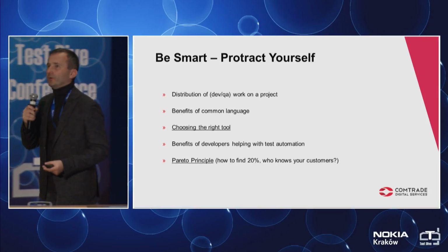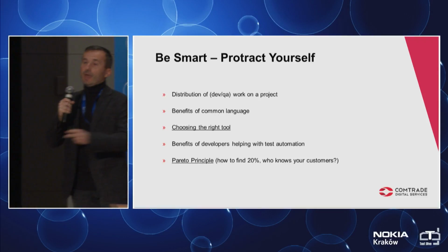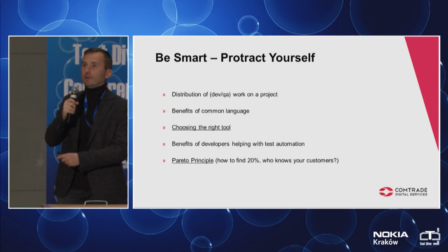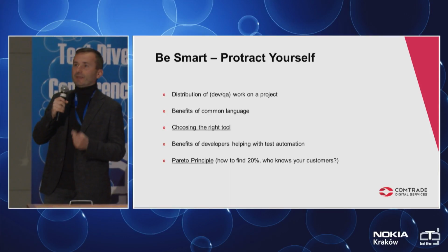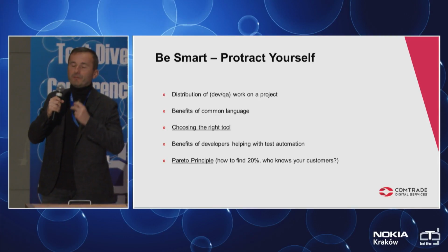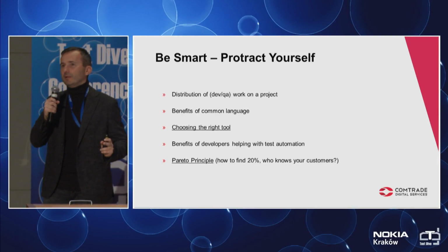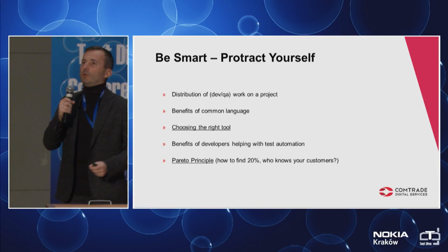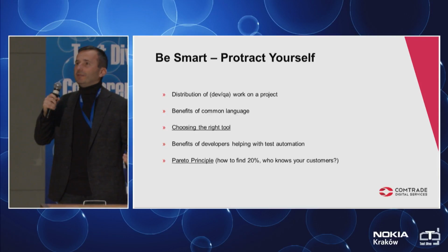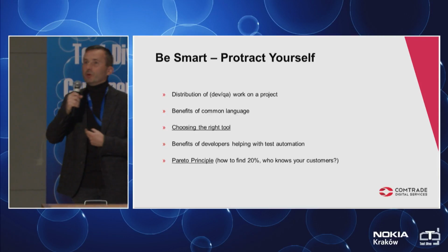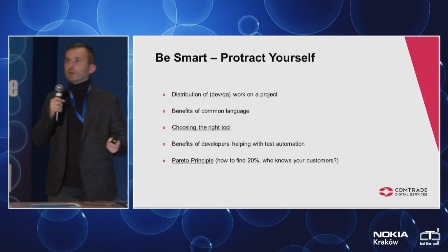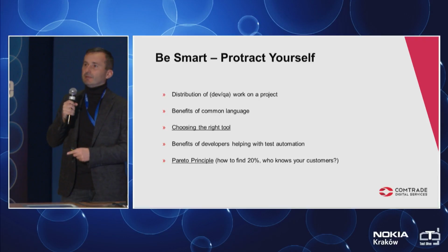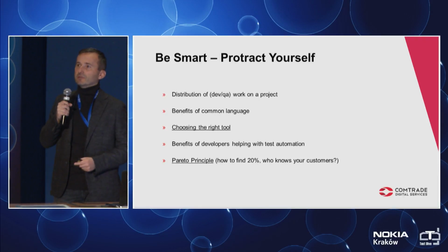Why? In the beginning of the project, there is more development, less testing. At the end of the project, everything is developed. Less development work, more testing work. However, there was not enough testing because they didn't have enough to work on at the beginning, so there aren't enough testers anymore. And the project managers usually fix that problem by adding more and more people to the project at the end, expecting them to do anything without knowing the technology, without knowing the product. However, on this project, we had developers helping testers by coding test automation scripts.